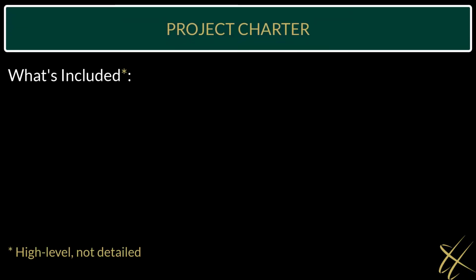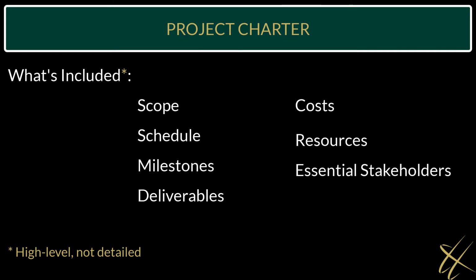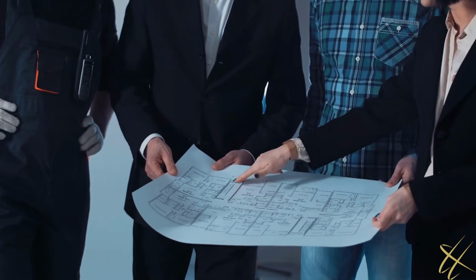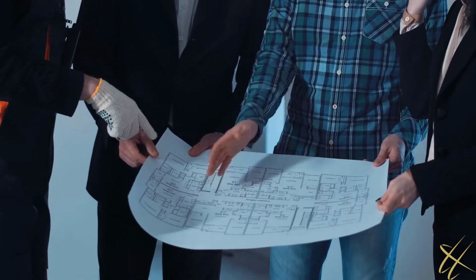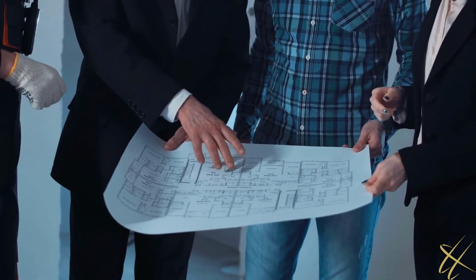Additionally, the project charter provides a high-level view of the scope and schedule, along with milestones and deliverables, costs and resources. It identifies essential stakeholders, defines how the project will be approved, and provides an exit plan should the project be cancelled. Lastly and importantly, the project charter includes agreed-upon success criteria so that the project manager and the sponsor can have the same expectations for project success.